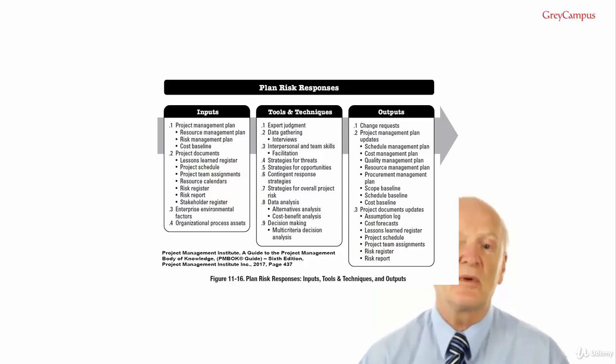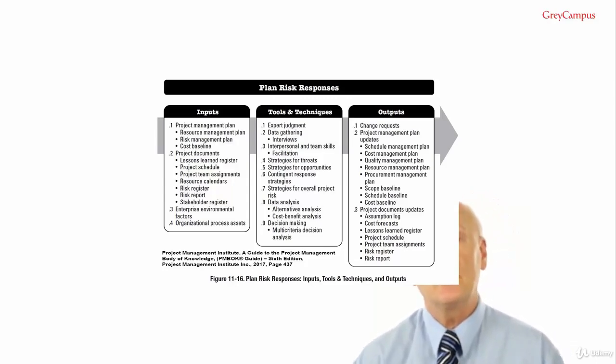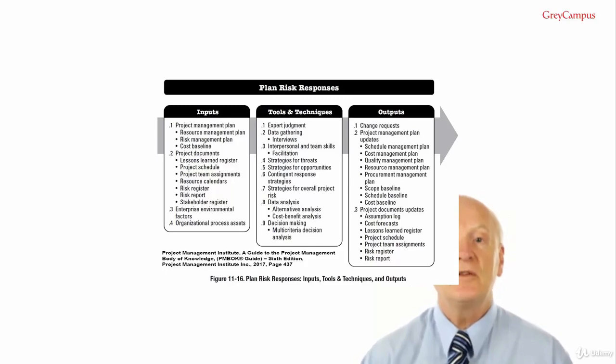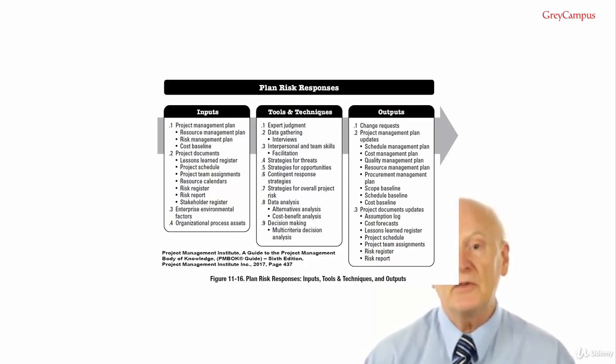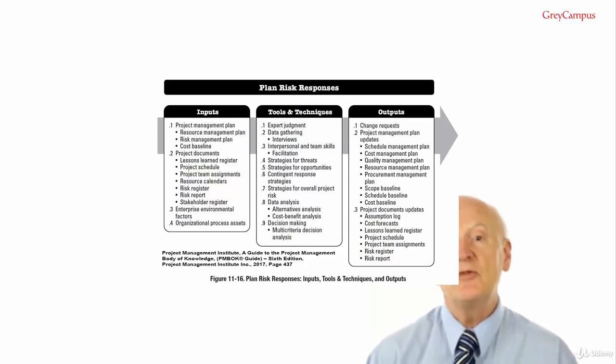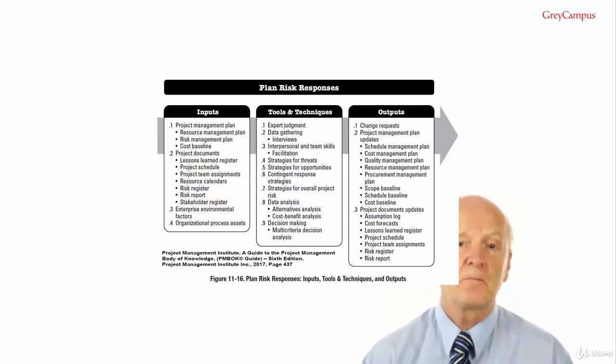The exam can trick you in this one. Sometimes they use a benefit cost instead of cost benefit. For example, a cost benefit of 2 to 3 means you obtain $3 of benefit from each $2 spent. With a benefit cost of 2 to 3, that means you obtain just $2 benefit with each $3 spent.